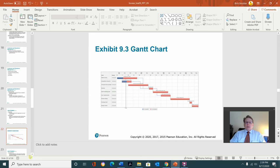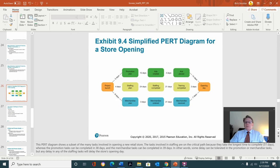And lastly, there's a simplified PERT diagram for store openings, covering promotions, ads, opening day, training, and merchandise received. If you don't have all of this done in order, it would be a very poor opening — for example, if you're advertising Lysol wipes on sale on August 18th but the Lysol wipes don't come until September, all that money spent on advertising is wasted. Okay, that's it for Chapter 9. Have a great day.